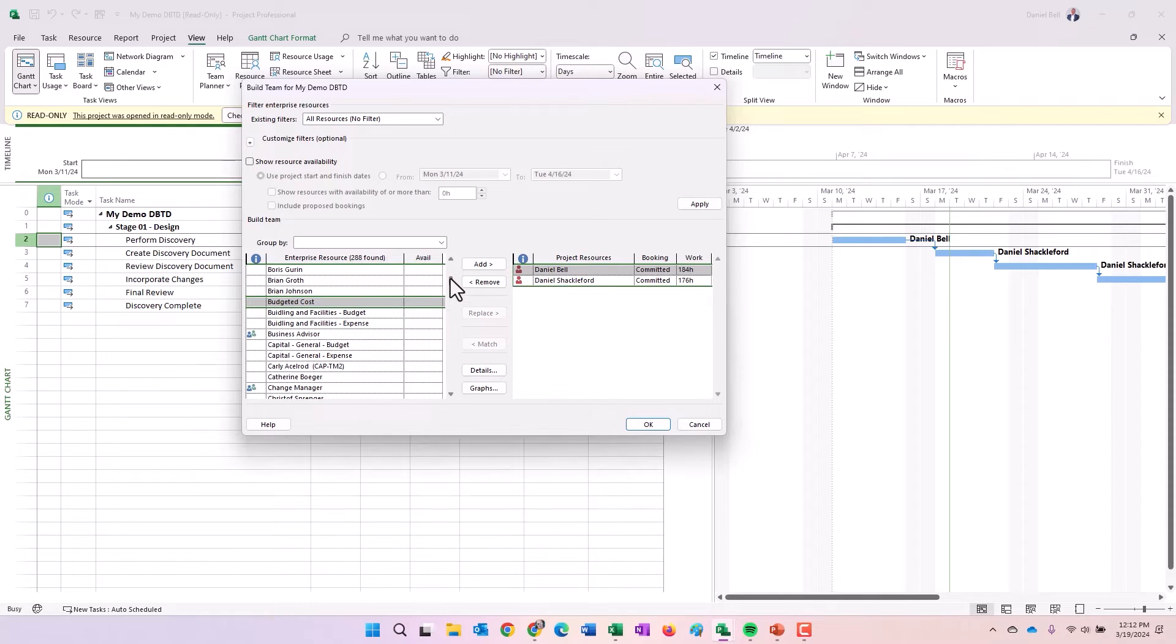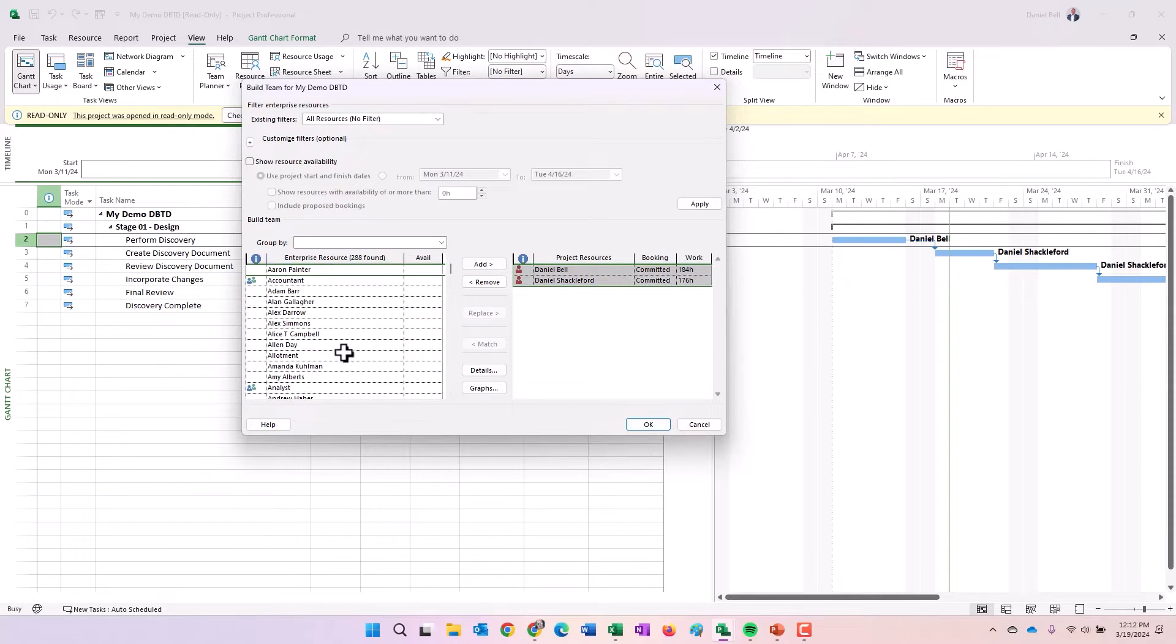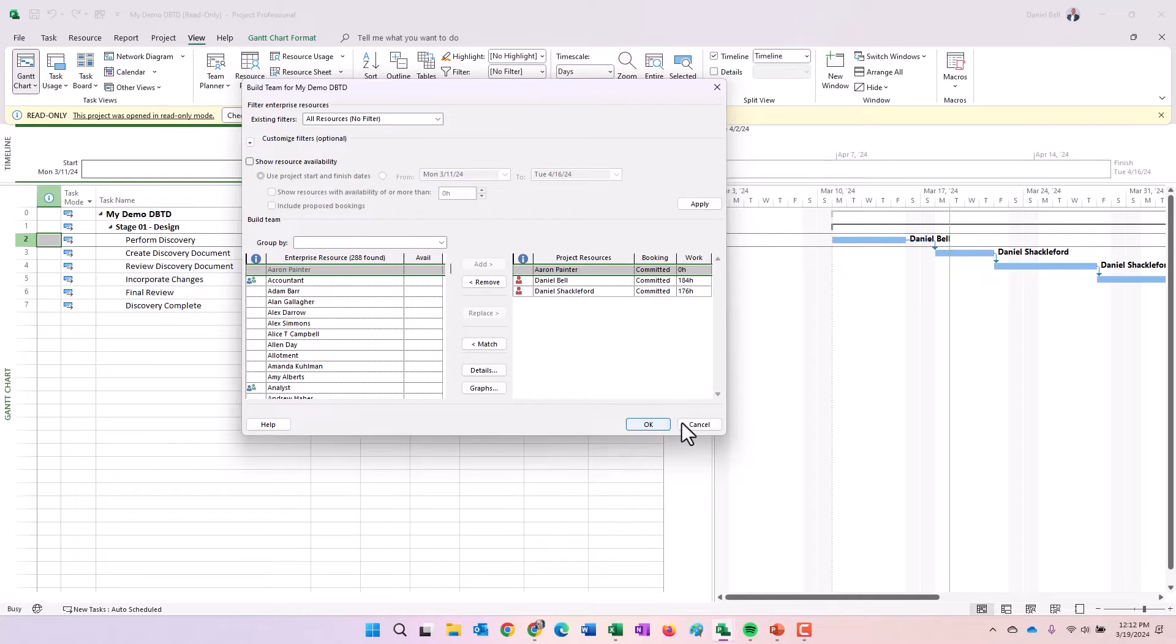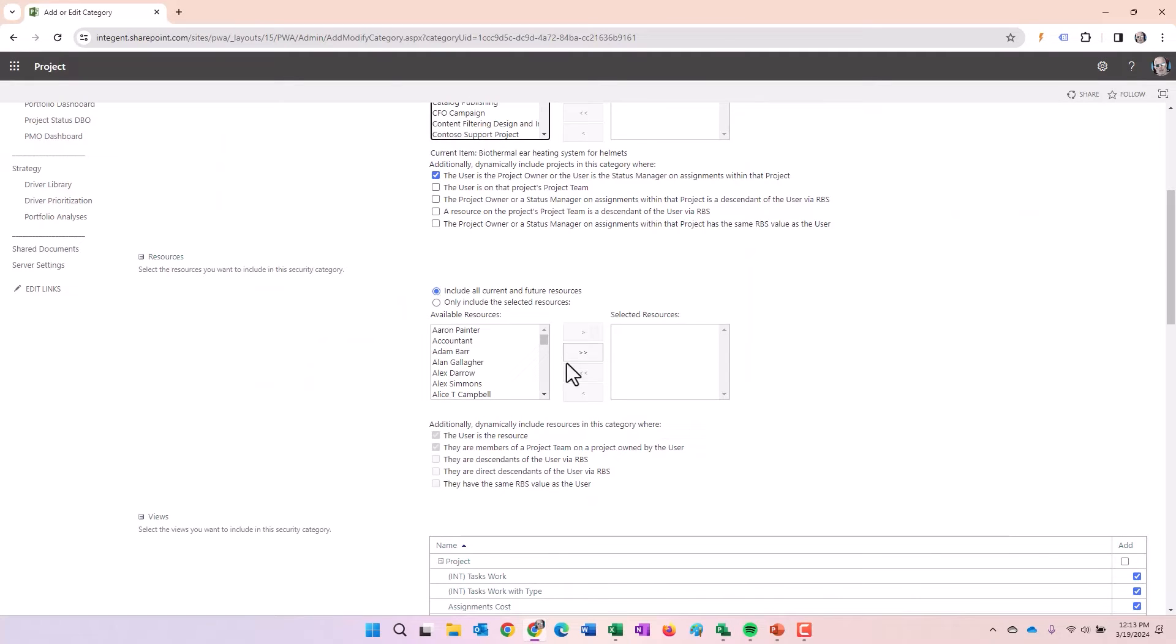If I wanted, for instance, let's scroll up here. Let's say we want Aaron to be able to see this project. He's a team member. That's going to do work on it. I can add that person to the team, save it, and then publish it. And then immediately Aaron's going to be given access to be able to view that project simply because you have the users in the project team selected checkbox.